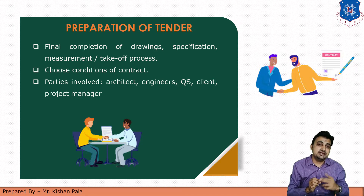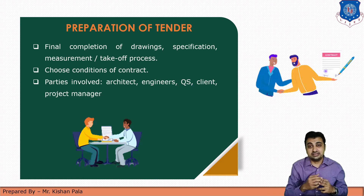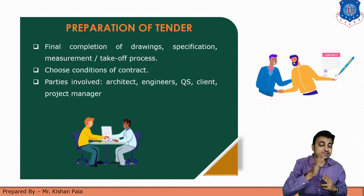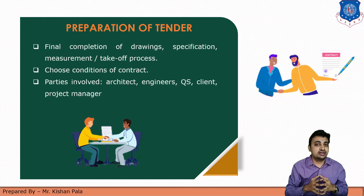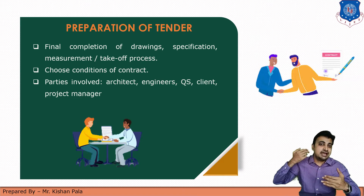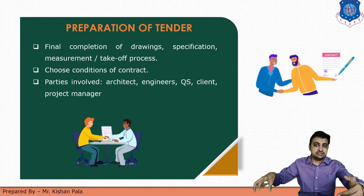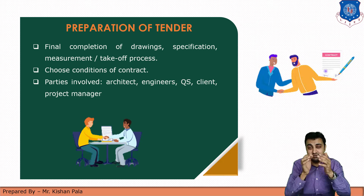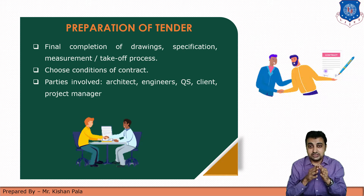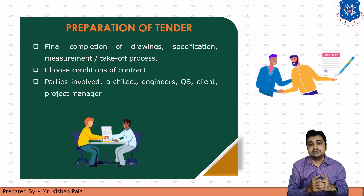The second point to consider in this stage is choosing the conditions of the contract — you have to define the general conditions and the special conditions. The next consideration is parties involved: which stakeholders are involved in that work — such as architect, engineer, QS, client, project manager. For example, if you are a contractor doing that work but the client wants inspection by a third party, then all those stakeholders should be mentioned in the contract. There should be certainty of all the requirements to complete that work, so there are fewer chances of dispute.